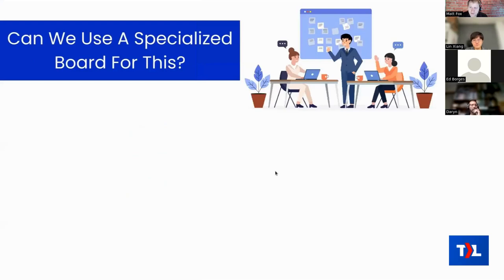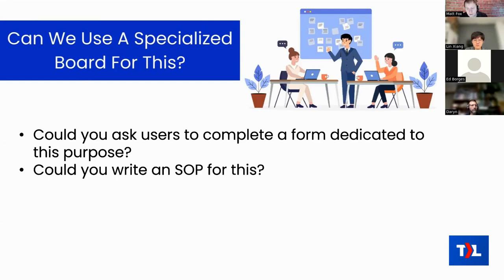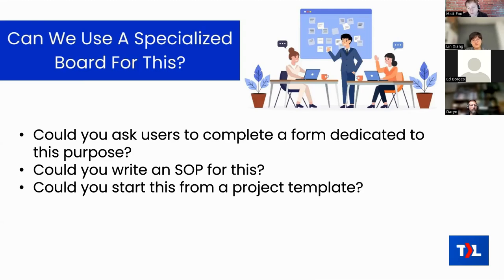To identify work that might lend itself to a specialized board, ask: could you ask users to complete a dedicated form for this? Could you write an SOP for it? Could you have a project template for it? If you answer yes, those are good candidates for a specialized board. In fact, if you're already using project templates in ConnectWise or Autotask, look at those — you may already have a decent start on identifying your specialized workflows.